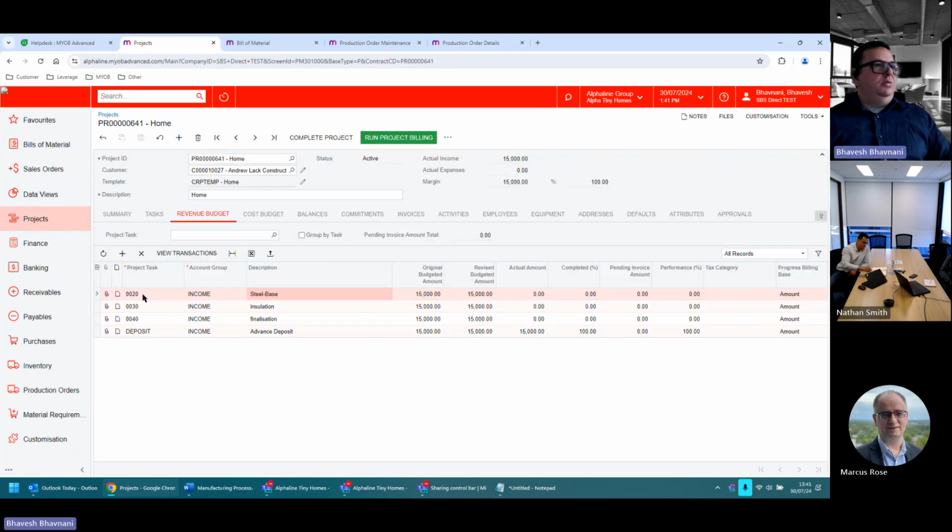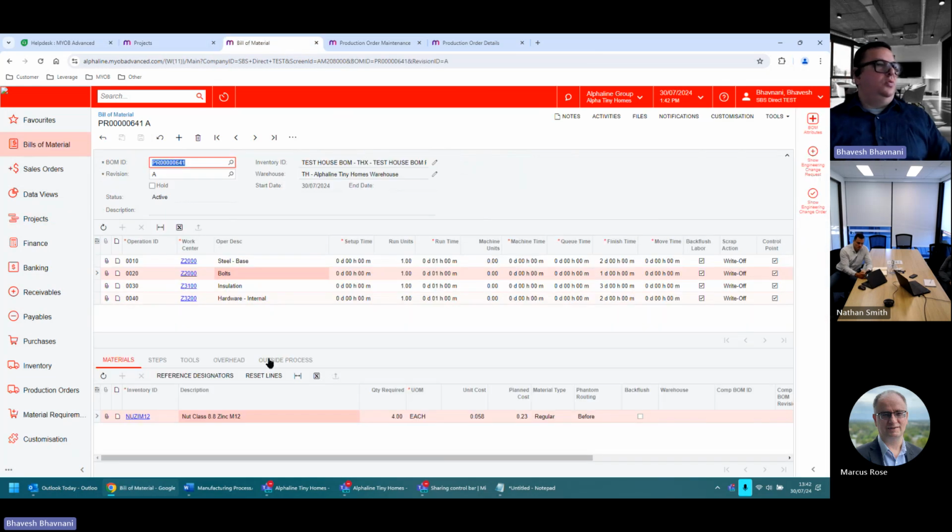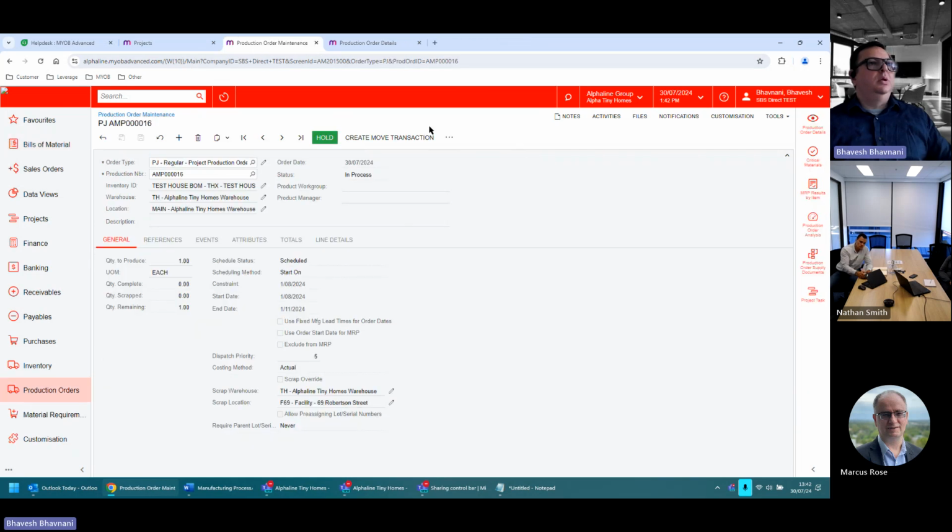Now, if you see here, I've told the project that operation 10 is not a milestone step. Operation 20, 30, and 40 are. 20 is when I actually complete my base. So let me go back to my, I don't need you anymore. Yeah. And issue some more material.